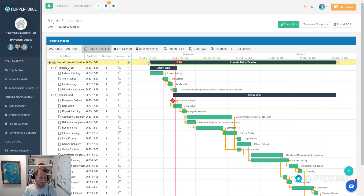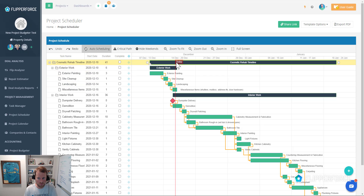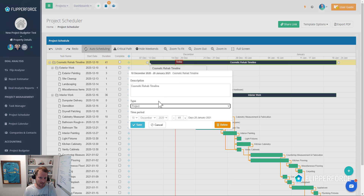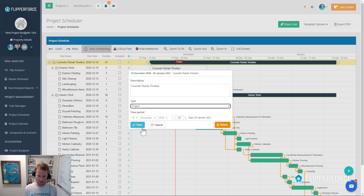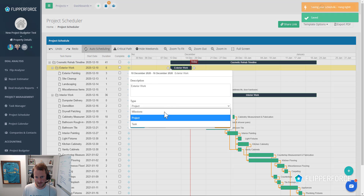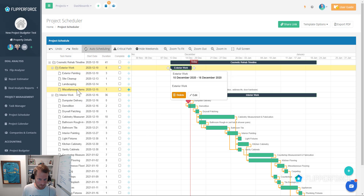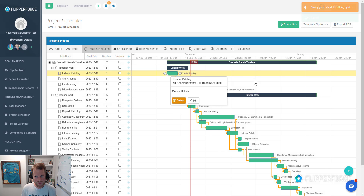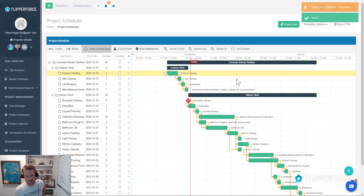The cosmetic rehab timeline is the overall rehab timeline — that's a project level task. Below that we've got another folder, and then below that we've got our actual work items. Project level tasks are used for groupings of subtasks. Same thing with exterior work — that is a project level task. The tasks below them are just regular tasks. Project level tasks aren't actually tasks that need to be completed; they're groupings of subtasks.